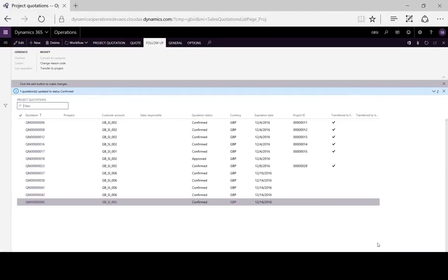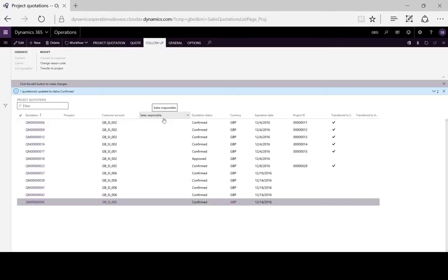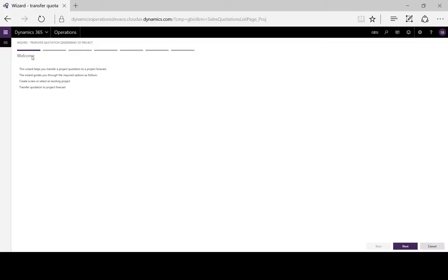Finally, after signing the contract, we can transfer our quotation into a project simply by following the project setup wizard, and then we have our project created directly from the project quotation.